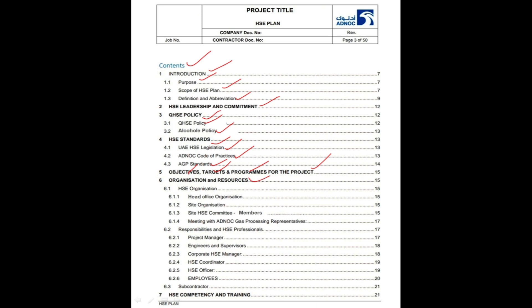Sixth one is Organization and Resources. In this section there are two subsections: HSC organization and responsibilities and HSC professionals. In HSC organization, there will be a head office organization and site organization, and site HSC committee members meeting with ADNOC gas processing representatives will be explained. In responsibilities and HSC professionals, all site key HSC personnel's responsibilities will be explained, including project manager, engineers and supervisors, corporate HSC manager, HSC coordinator, HSC officer, employees, and subcontractor responsibilities.